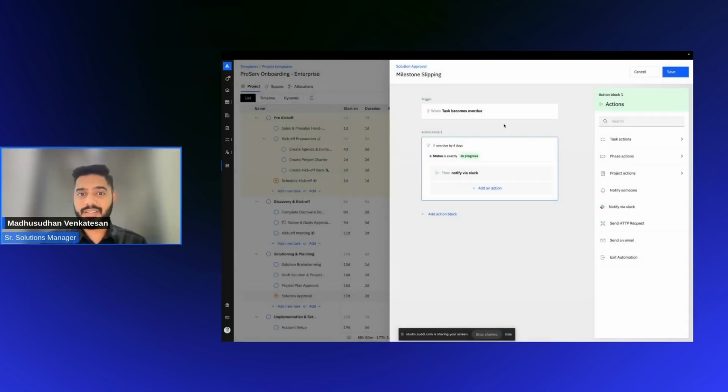You can also form an escalation matrix to say, hey, if nothing happened after 4 days, wait until the sixth day and escalate it further up the chain. So this can be keyed in at specific intervals at specific points. So there's always some early warning signal and proactive alert that you get, rather than having to wait until things turn sour and then having to firefight. This makes it so much easier for people to stay on top of things.